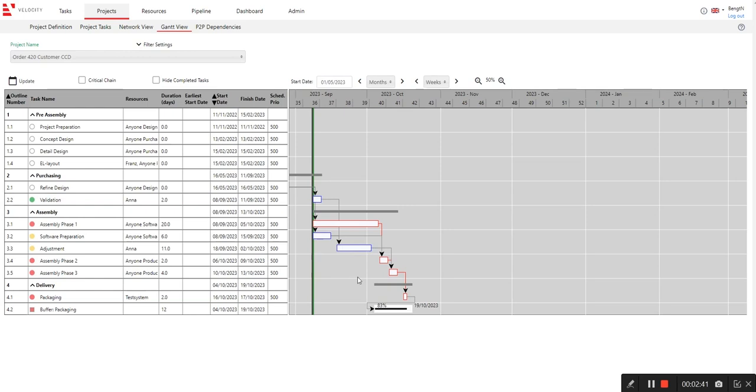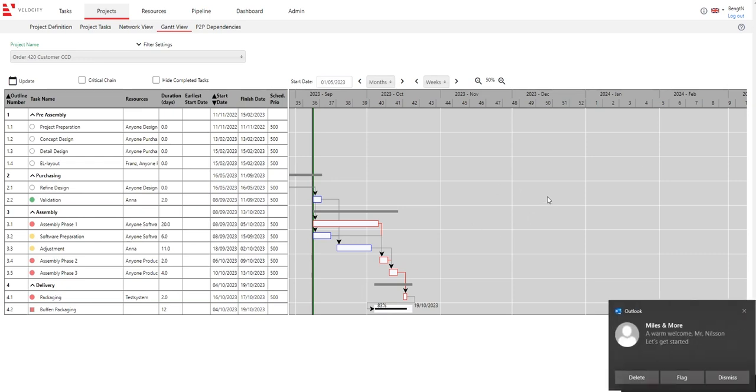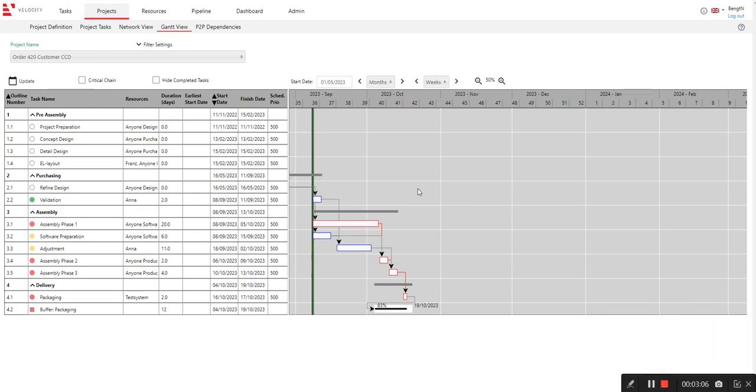So it is in fact still in the green zone, whereas these two are quite close to becoming critical, so they are yellow. So it means that in Velocity, you see not only the risk of a project of being late, but you actually can identify what tasks within the project are responsible for that situation and what tasks are not. So you know what to hurry up and what is not so time critical. Okay, so this gives you a little bit of understanding of the information you see when you look into Velocity. So we will keep this in mind when we look at the real problem we are going to look at.